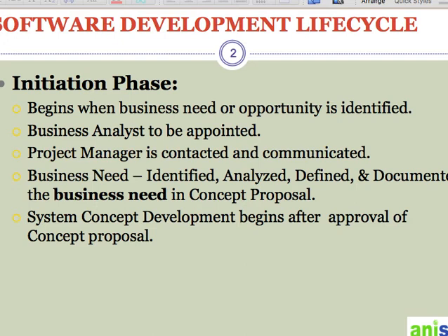Once the business analyst analyzes and defines the problem area or opportunity, an impact analysis is done to understand the impact of the problem or opportunity on the overall business. This is an important factor we need to understand, because if the impact is not significant, we may want to not do anything, and that is also fine. That could also be one of the options, right? Not doing anything. That's what we may consider. But if the impact is significant and severe, then the solution needs to be implemented quickly. Okay.